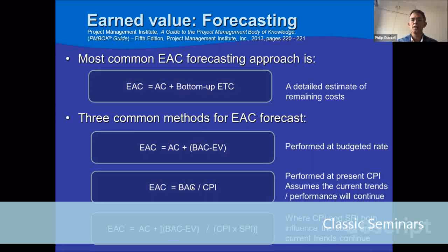And then the last option is to calculate the EAC and consider the costs that have been spent already, sunk and spent. They've already gone out. So we accept the 600 Rand that has been spent. We look at the remaining work that needs to be done. That's BAC minus EV, which is the 600 Rand that remains to be spent. But now we factor in both the lateness and the overrun, both factors. So the lateness factor is SPI, which is equal to 0.8. The overspend is your CPI or cost performance index, which is 0.666 remaining.